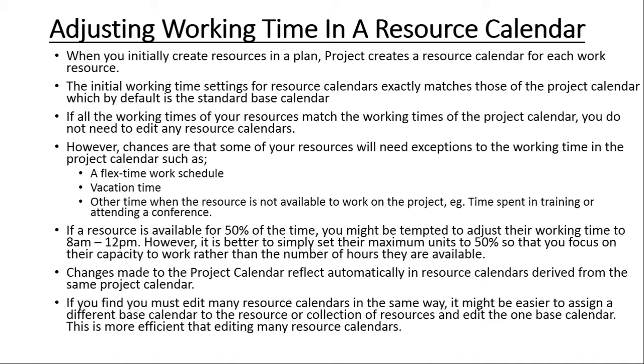So in other words, besides the standard calendar, you create a new base calendar. That is where you make the changes that will be applicable to all these people that need exactly the same change. So you are no longer changing the individual resource calendars, but you simply change one customized calendar.